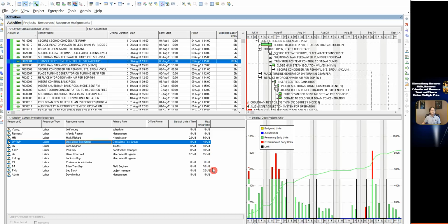After you assign the resource to the schedule, if you want to level resources, you must set availability limits. Define the multiple price. Primavera P6 allows you to define multiple prices for you to use in different situations and different times. It provides you 5 options to make user-defined.